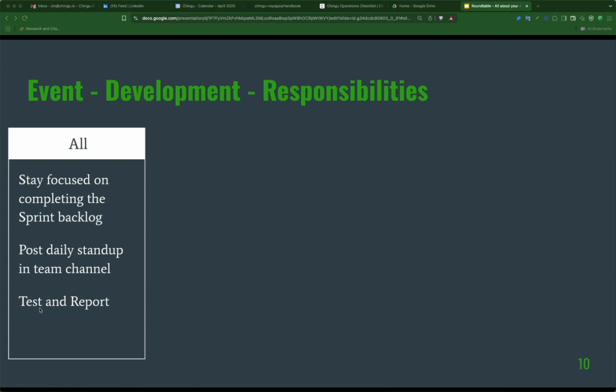A lot of complex answers can come out of that question, but that's generally what you're working for in a project. The total sum of all of your must-have product backlog items is the definition of what's in the MVP. And everything else, a nice to have or a should have, it's great if you can complete those, but they aren't required to finish the MVP.